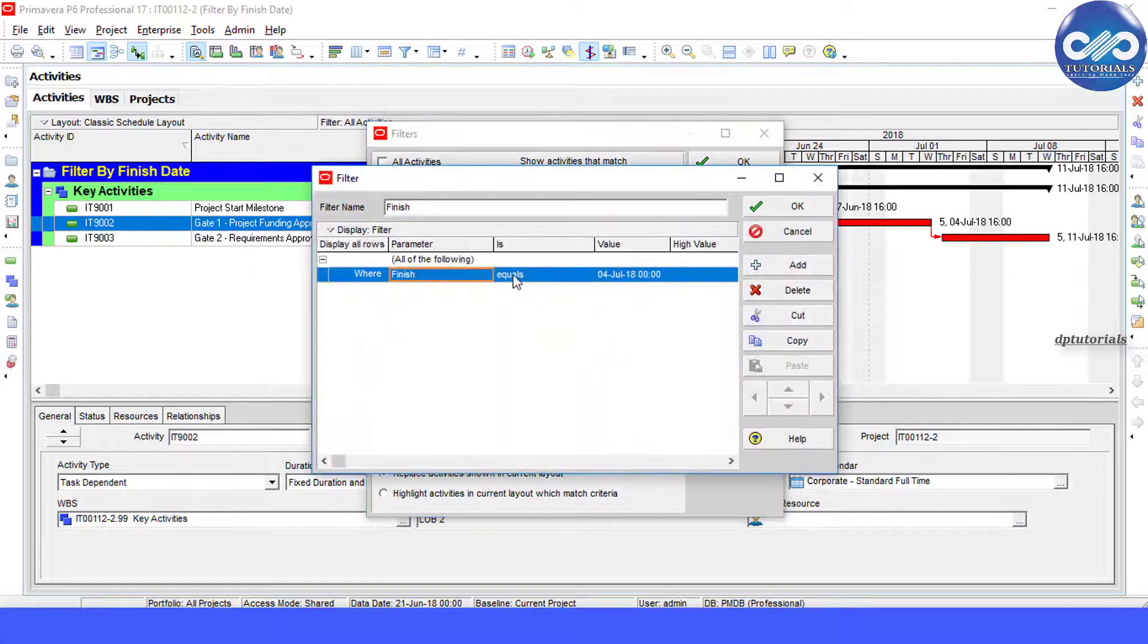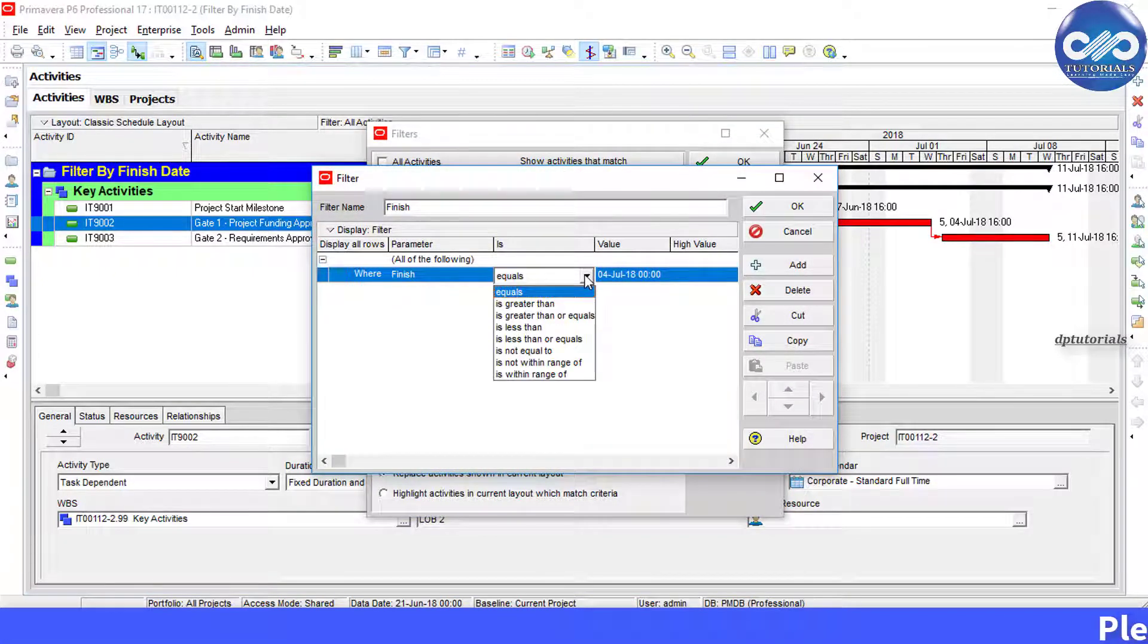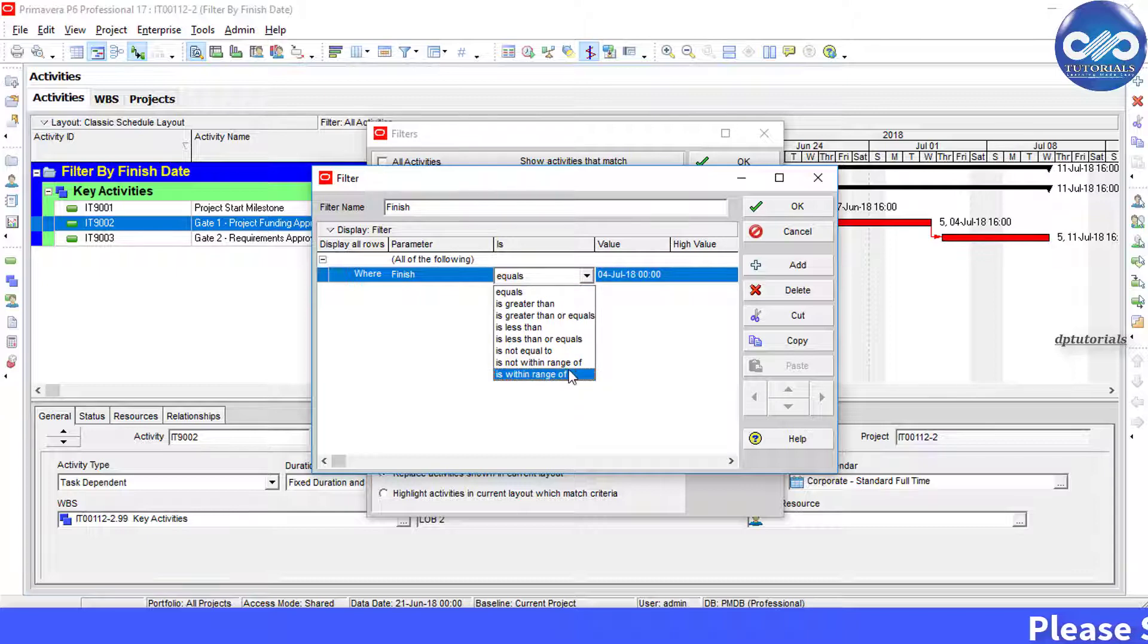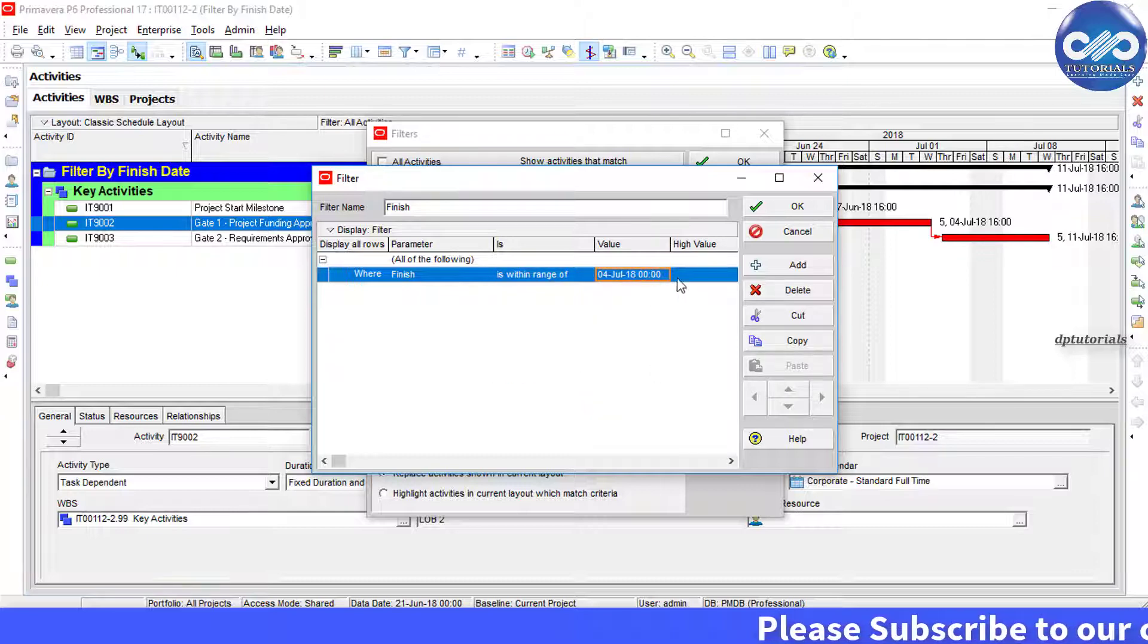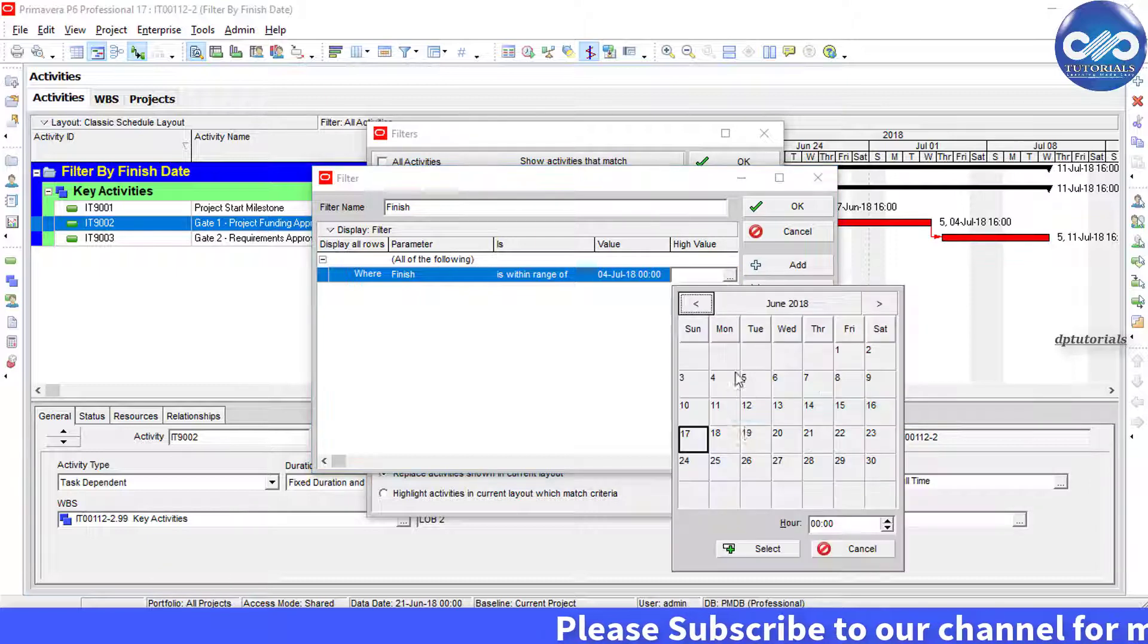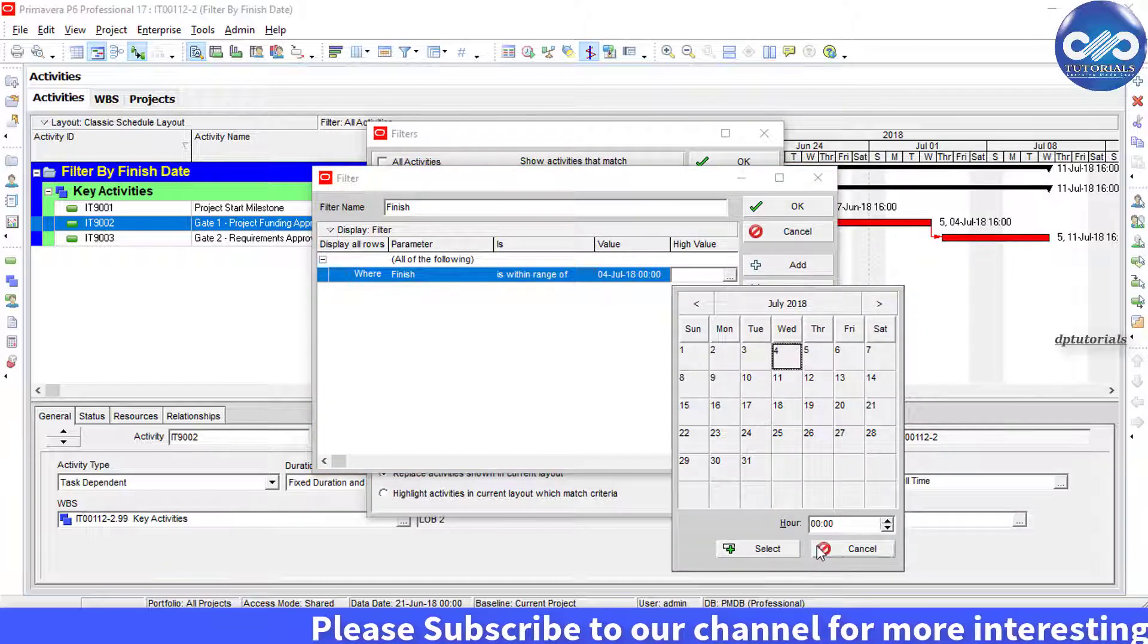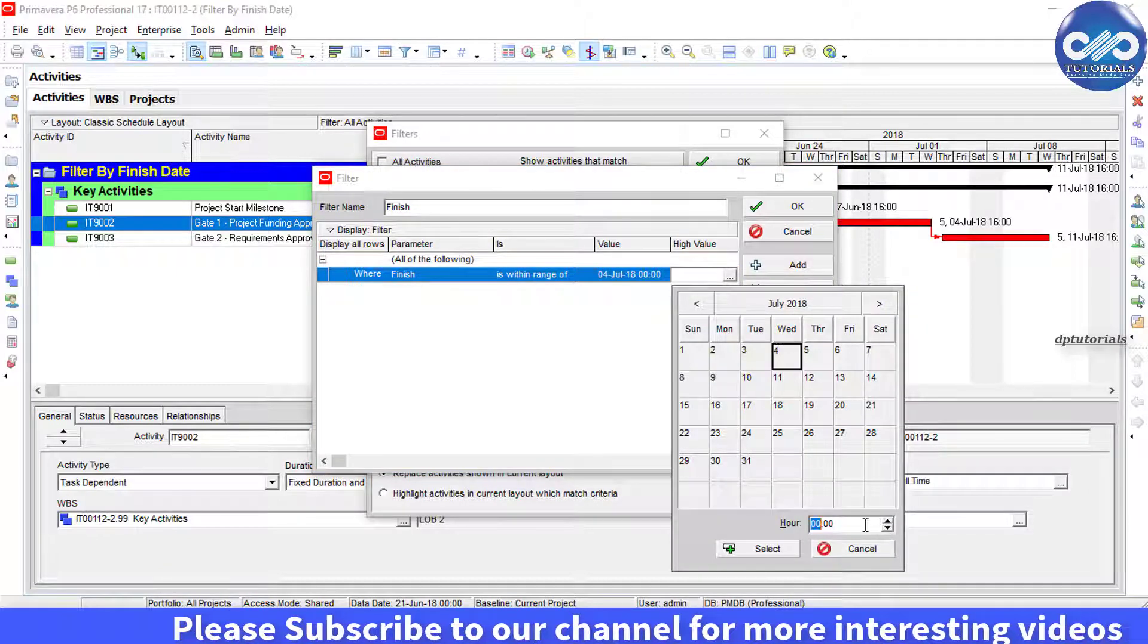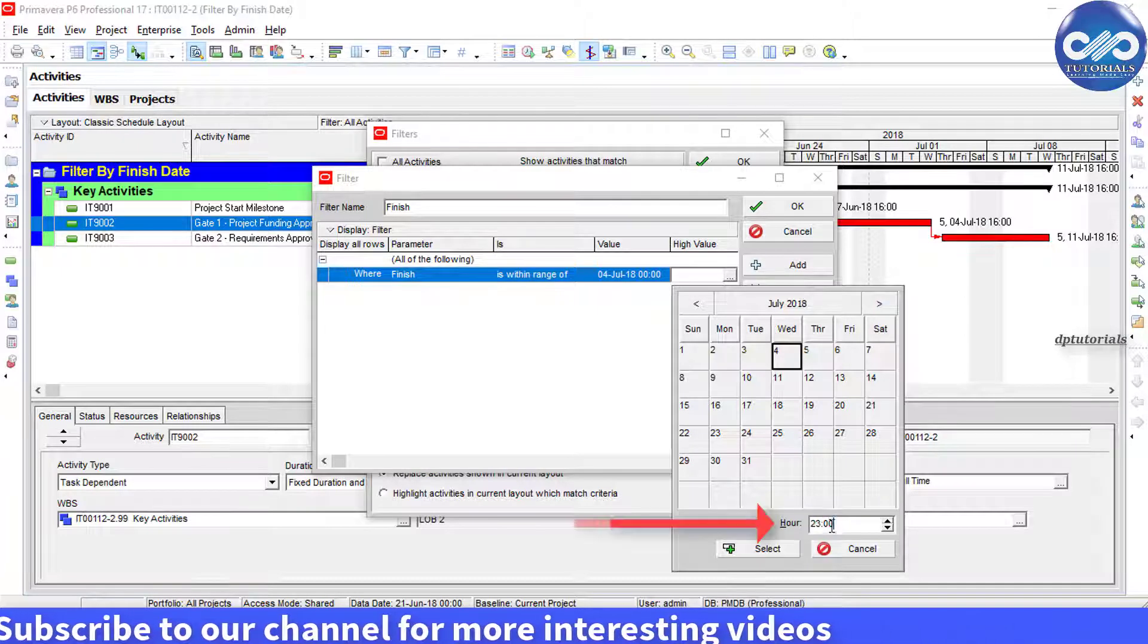Where Finish equals, change it to where Finish is within the range of from 4th July 00:00 to 4th July 23:59.